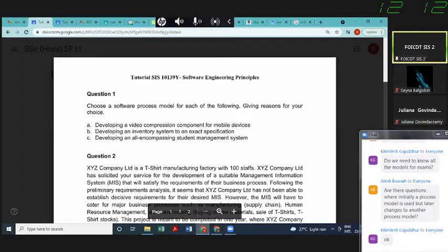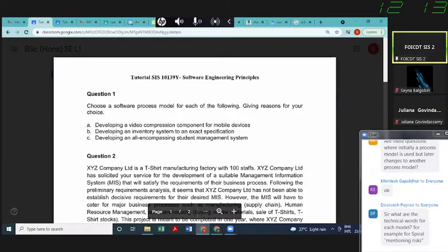So this spiral model is going to be used in projects where we have high elements of risk. Another element of risk can be, for example, I'm working on a mobile application like Juice, but my competitor is also working on this and is planning to release the software before I release mine. If I release my software after my competitor, mine is going to become obsolete on the market. An element of risk. So for such projects, the spiral model is good because we would focus on really tackling these risk aspects, and this would be appropriate.